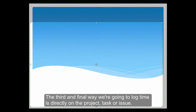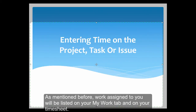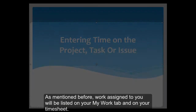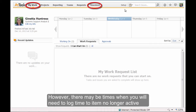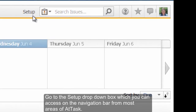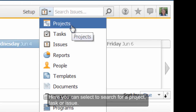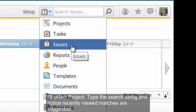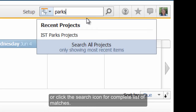The third and final way to log time is directly on the project task or issue. Work assigned to you will be listed on your My Work tab and on your timesheet. However, there may be times when you need to log time to an item no longer active or an item you're working on but are not assigned to. Go to the Setup dropdown box, which you can access on the navigation bar for most areas of ATTASC. Here you can select a search for a project, task, or issue. I'll select Project. Type the search string and notice recently viewed matches are suggested, or click the search icon for a complete list of matches.